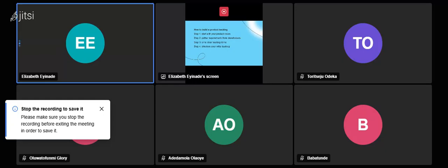You now write them in a clear backlog item. Just keep writing them. First thing first, so that you do not overwhelm yourself or you do not miss it, write out all your product backlogs, even if they are not in the order of priority that they should be. First thing first, write out all of them. Okay, you have 1000 items to be in your product backlogs. Write all of them.